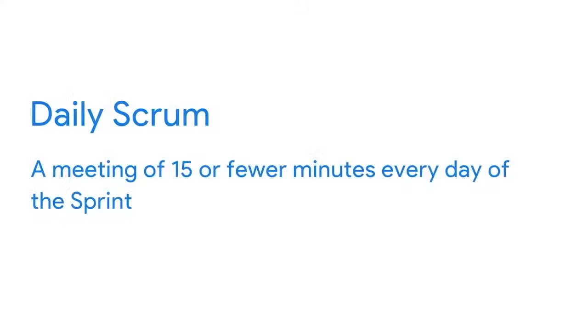And then there's a practice called the daily Scrum, also called the stand-up. This is where the team meets for 15 minutes or less every day of the sprint to inspect their progress toward their goal.